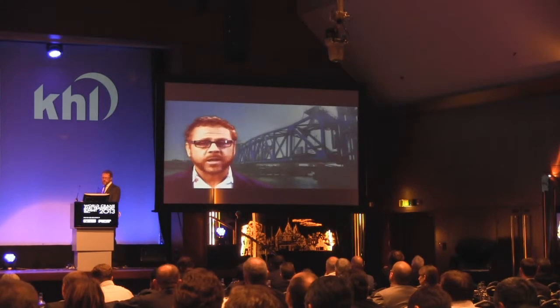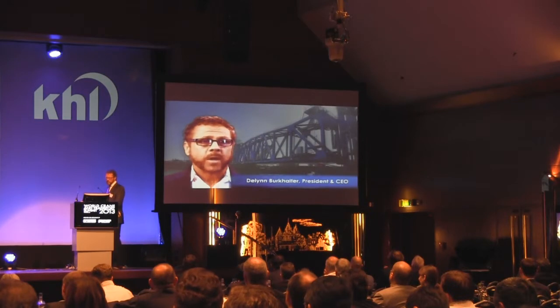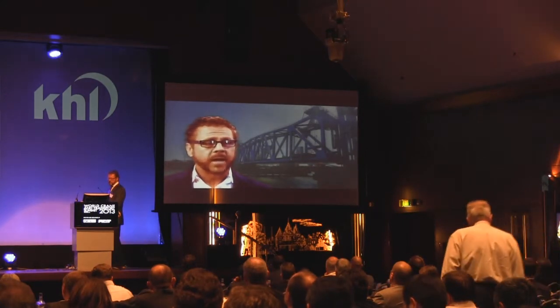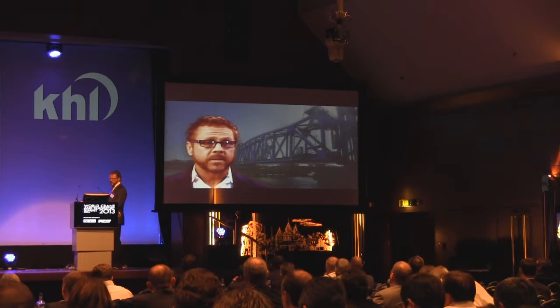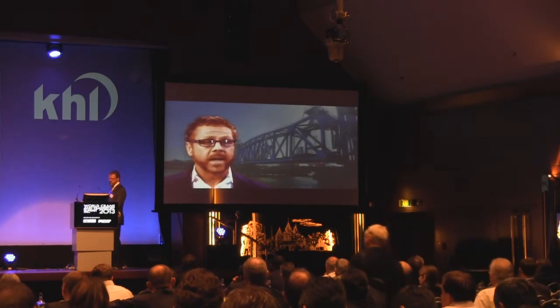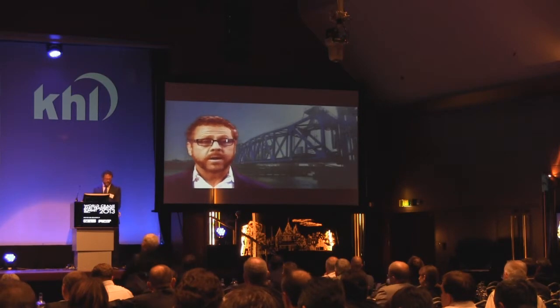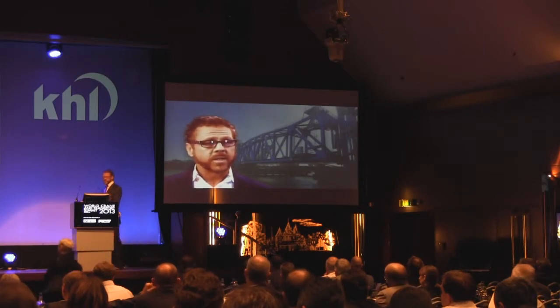So we have this huge bridge, a railroad bridge. It's almost 400 feet long. It weighs over 3 million pounds, and we have 2.5 inches of clearance on both sides. Quite a tight fit when you consider 400 feet and it's on a barge and it's got 300 feet hanging off the barge. So we had to come in perfectly square and level for it to ever clear.